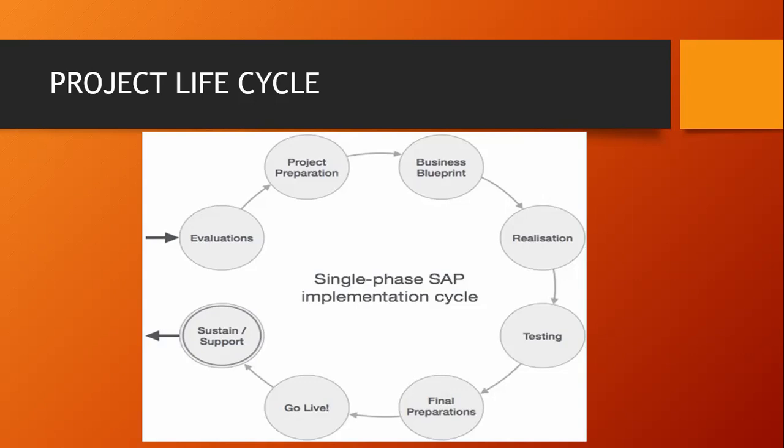And this is actually the process. But this process, you see, can take a year, it can take 6 months, it can take 8 months, depending on the nature of the organization and how large or vast their operations are. One of my instructors told me that in some companies they use 2 years to deploy SAP, and those 2 years is not like they have breaks, they keep working, especially if the company has various branches everywhere in the world. They have to go to these branches and make sure everything is working according to plan. So it's a whole lot, and they need a whole lot of people on every one of these phases.